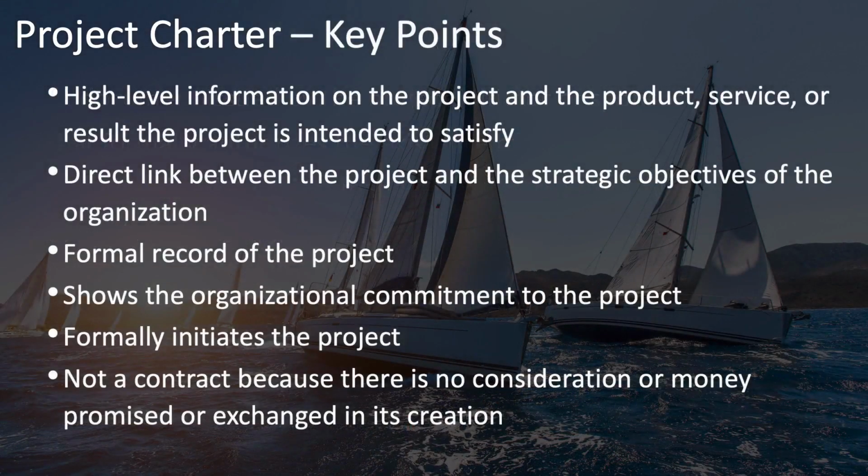A project charter does establish a partnership between those that are requesting the project and those that are going to be implementing it and making it happen, but it's not a contract. If, on the other hand, you have a project that needs to be outsourced and be performed by an external vendor, then you will need a formal contract, and that's something we'll cover in procurement.